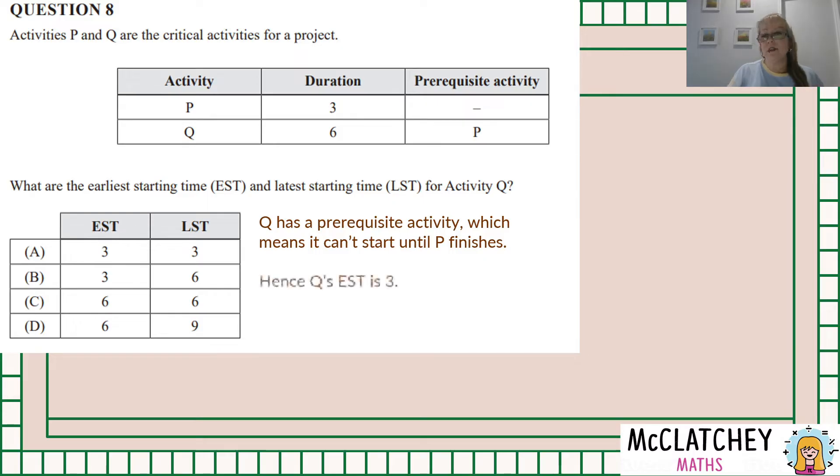Now because they are the only activities we're told about in the particular process then it's on the critical path, it has to go boom boom boom one after the other. So the next one is going to take place which is Q straight after that so the latest it can start is also three. There's no fill time in the middle between the two activities they've got to continue one after the other in order for the project to be finished in the shortest possible time. And that's the whole point of what a critical path is. So that means our only possible option is A.